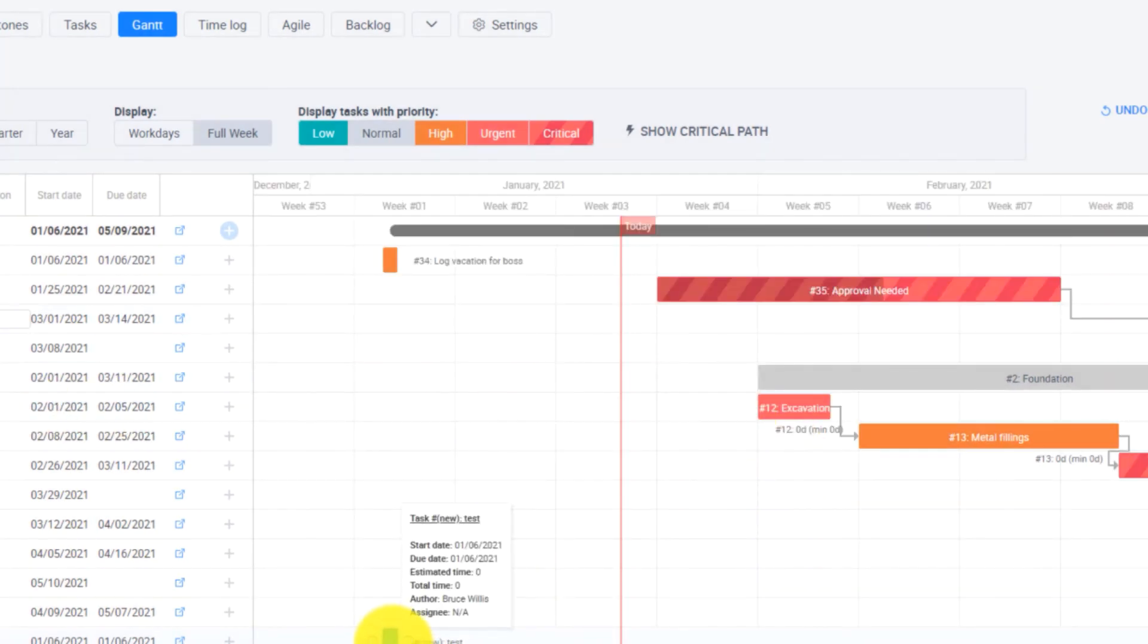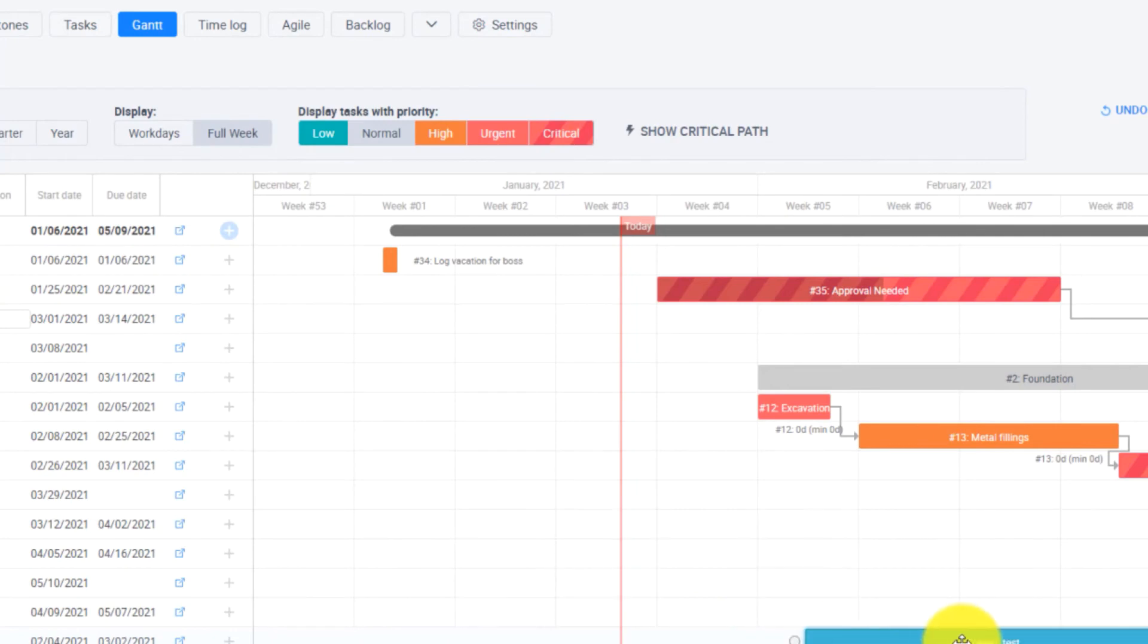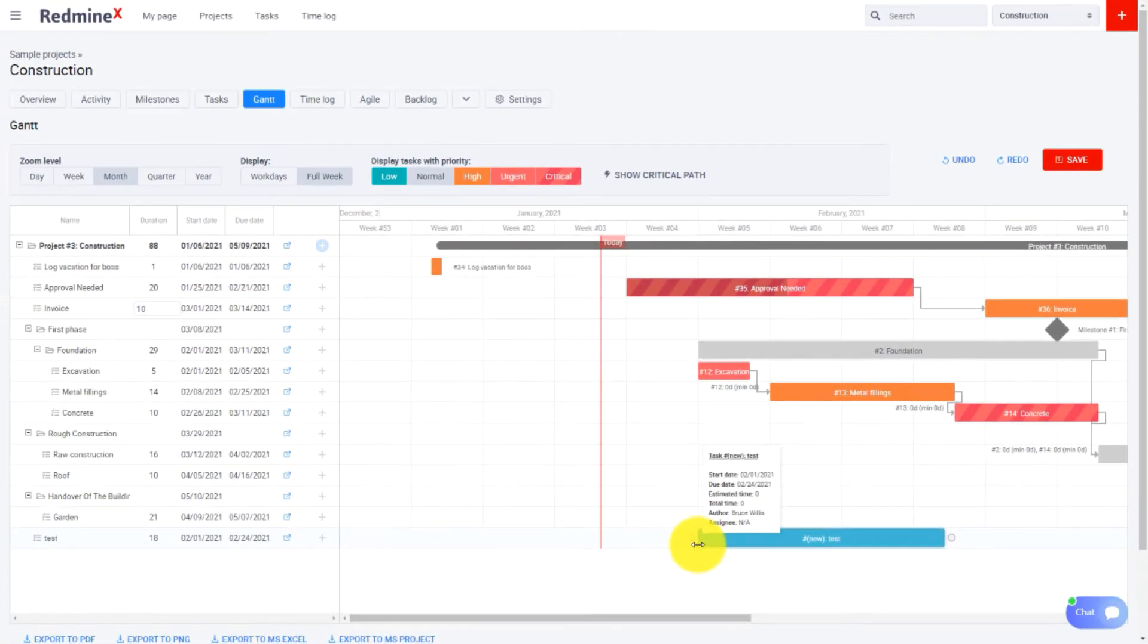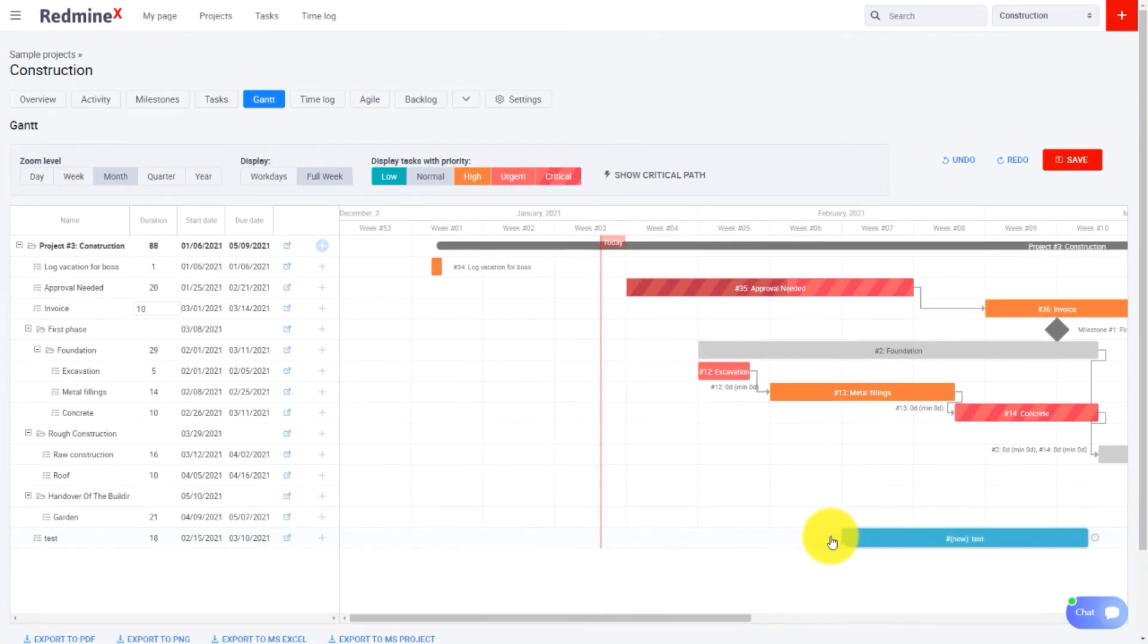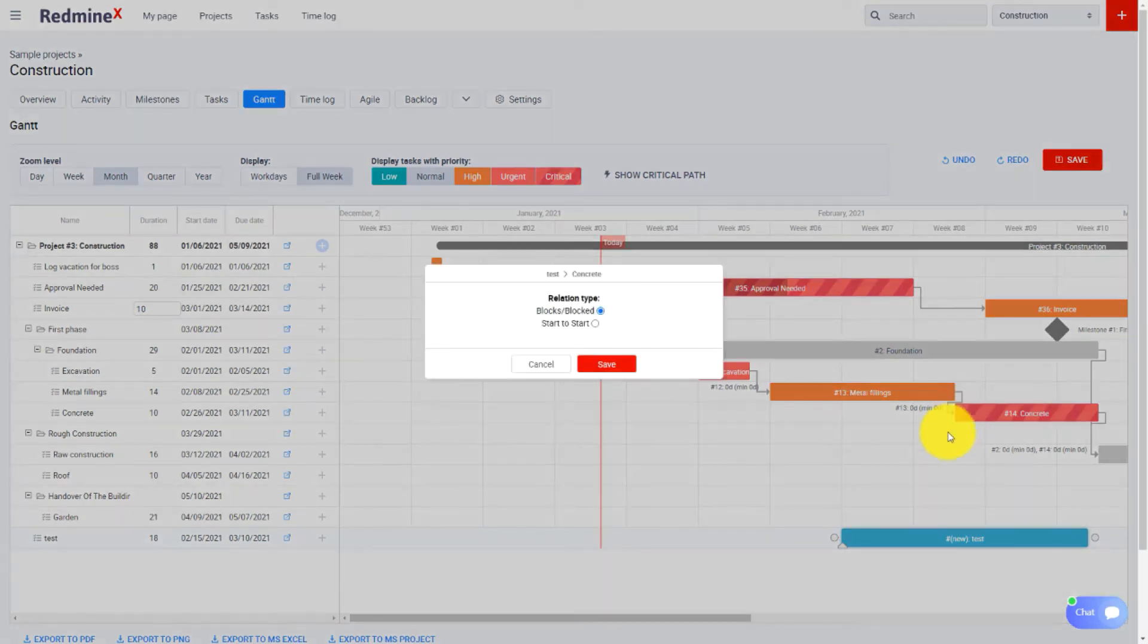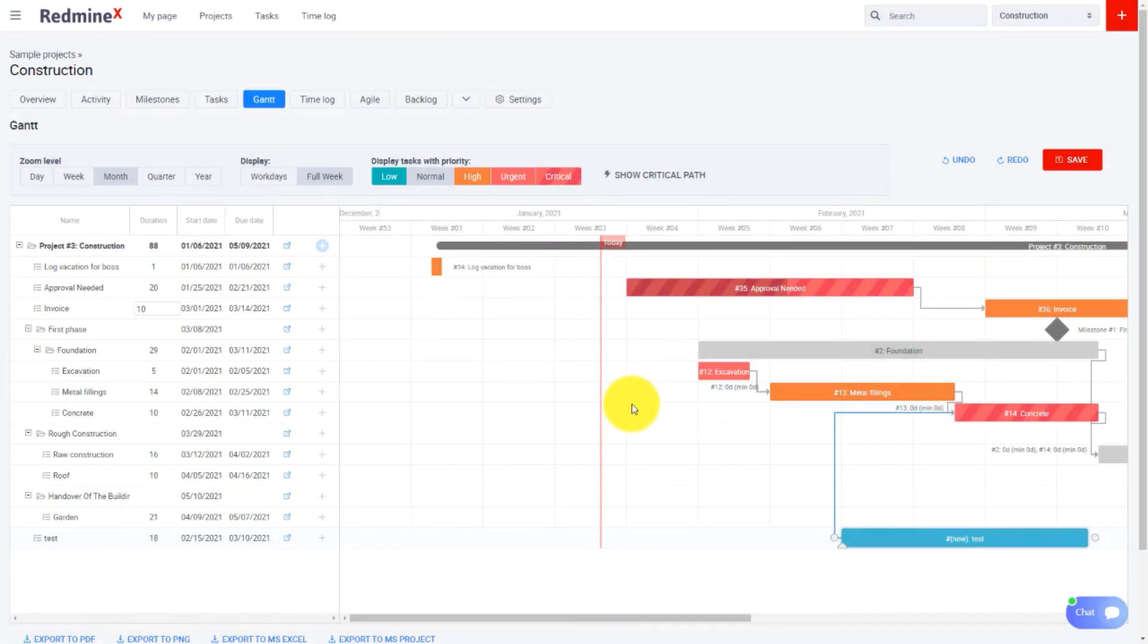Later you can easily change the task duration or the position of the task in time. And if you want to you can create a task relation just like this. If you click on the plus in the task row you will create a subtask.